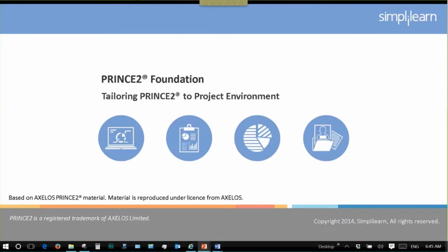The purpose of the closing project process is to provide a fixed point at which acceptance for the project product is confirmed, and to recognize that the objectives set out in the original project initiation documentation have been achieved (or approved changes to the objectives have been achieved), or the project has nothing more to contribute. So we're verifying that the objectives that were supposed to be completed during the project are completed, and then we have nothing more to contribute, and the verification of the subsequent objectives would be part of your benefits realization plan.